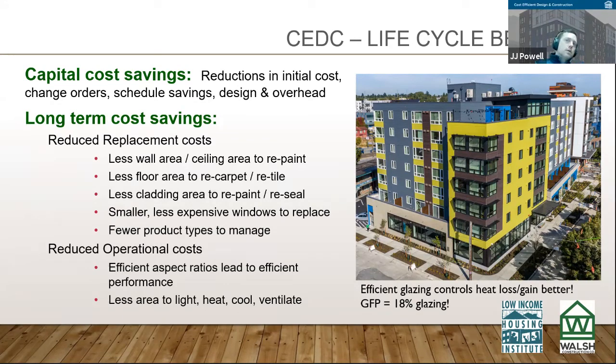From a construction standpoint, it allowed us to frame half the number of walls that we might typically frame. We're not putting up two walls right next to each other. We're putting up one, and then the drywaller puts on that resilient channel later. So we get the roof on faster, and we're able to dry in sooner. And the single stud buys us 4 inches of space at every wall. That's super valuable and lets us get more and more units in.